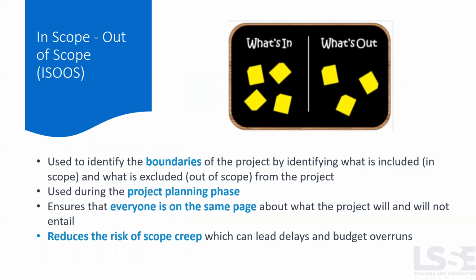further along the project execution, your boss might say, how come you did not include Singapore? How come you did not include Vietnam? And you will have scope creep. Suddenly you get all these additional requirements, and it will spread your resources thin. It can lead to a delay in your project. So it's quite important to set the scope of your project.